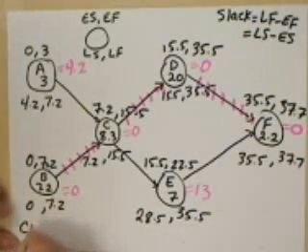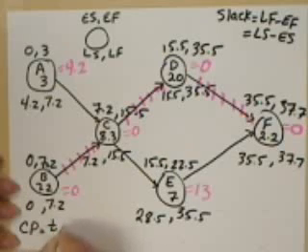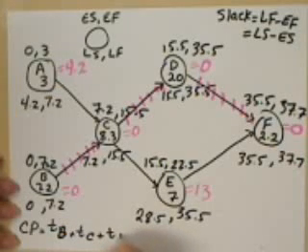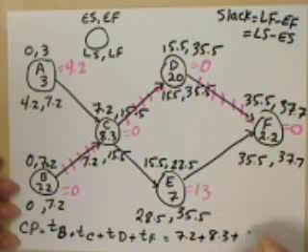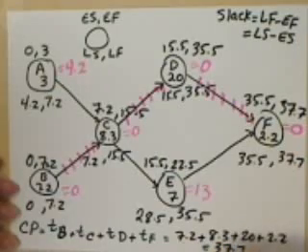Notice that the time for B plus time for C plus time for D plus time for F, which are the critical activities, which is the 7.2 plus 8.3 plus 20 plus 2.2, gives us the 37.7, which is the average duration for this project.